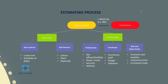Let's go back to looking at our diagram we introduced in the introduction of the estimating process. The basic structure of our cost estimate will be quantifying direct and indirect costs, combining these to get our total project costs. We'll then apply a markup to cover our profit margin and corporate overheads to get the price we submit to the client.